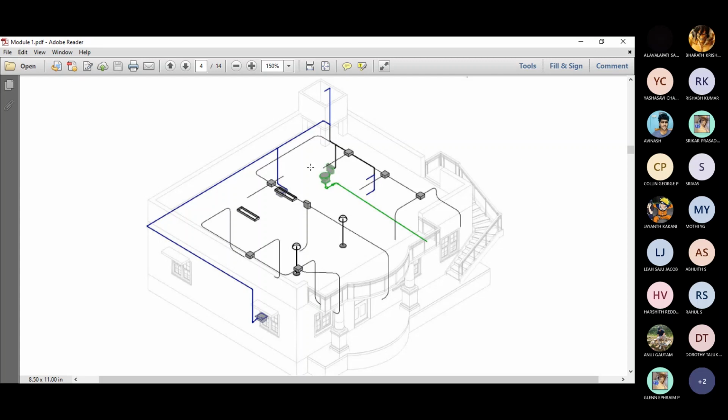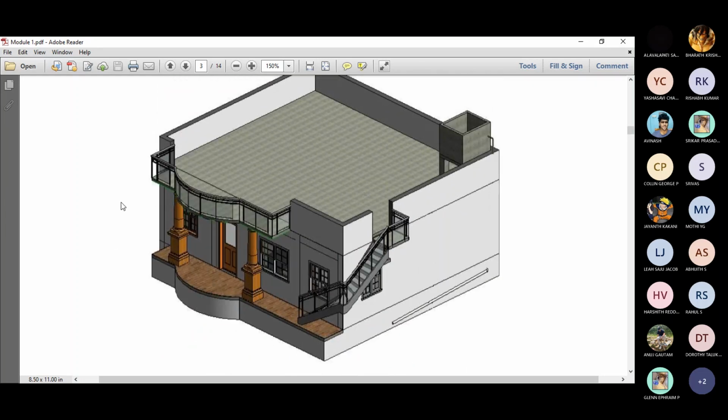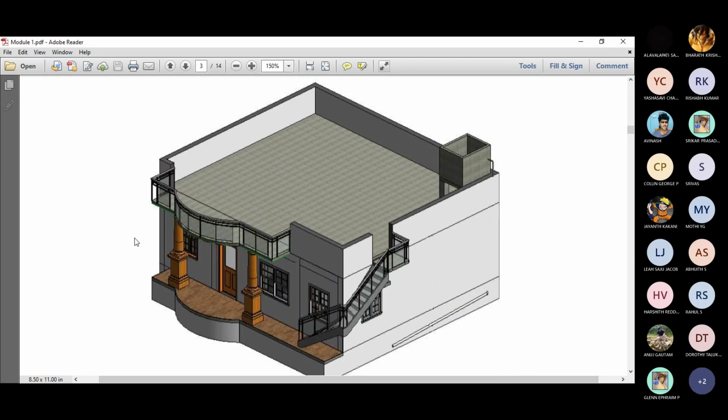So this gives us an idea of the number of water closets and the running meters of the plumbing lines and the electric lines. And not only that, we can also see the different elements, the height, the width and the depth, so that you can estimate quantities like how much earthwork you have to do, or how much concrete you can optimize, not use, but optimize.